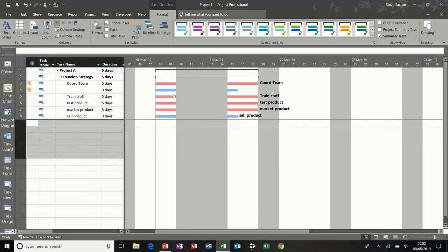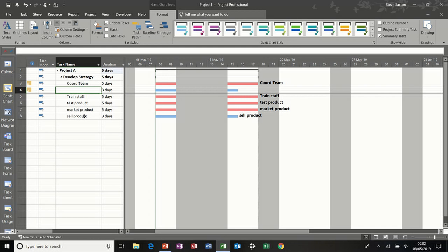Now we get a load more tasks going critical. So these are all critical. These ones are not critical because there's a gap there, a 2-day gap there that could move forward on. Likewise with that one. But again, it's showing you critical. I've killed a task there, haven't I? Core teams develop project. I think that was product.